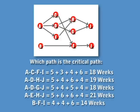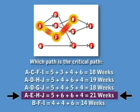So what that means is that our critical path is A, E, H, J, because it takes 21 weeks — that's the longest duration of any path in our project. These activities are not going to have any slack time on them, and that is the path that we're going to monitor through our project.